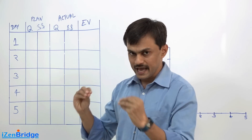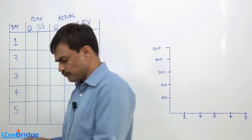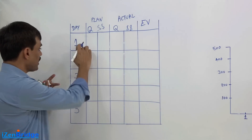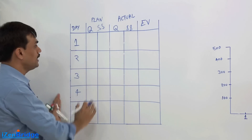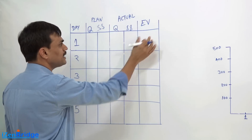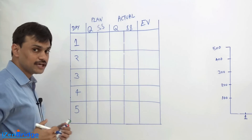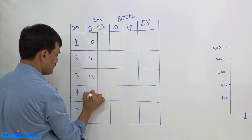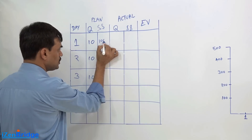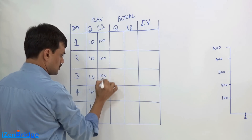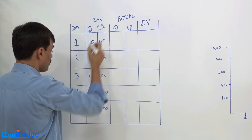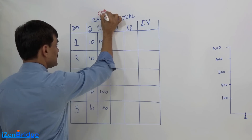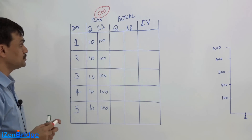Let us make this plan a little more elaborative and visible. I have a table where I have marked days 1 through 5, with columns called Plan, Actual, and Earned Value, which I will elaborate on later. As project manager of this installation project, I am planning to install 10 machines every day and spend 100 dollars per day. That makes my overall project estimate 500 dollars — I will get 50 machines done for 500 dollars.